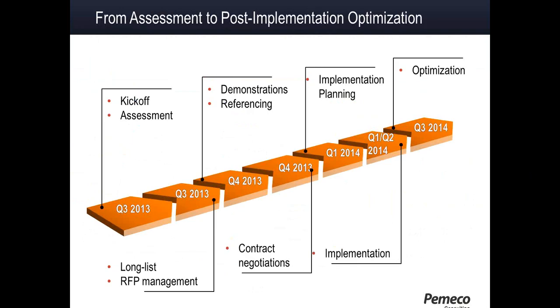From the assessment itself, and if you take what we consider basically a pre-implementation schedule, our schedules tend to run anywhere from a 5 to 6 month time frame. That seems lengthy to some people, but the kickoff and assessment will go fairly quickly.